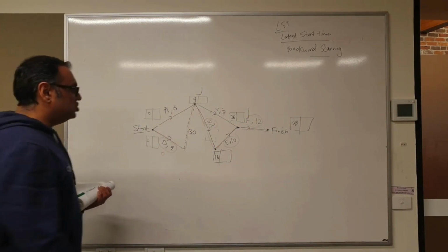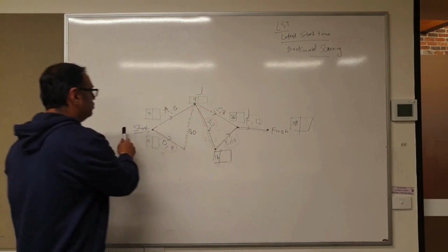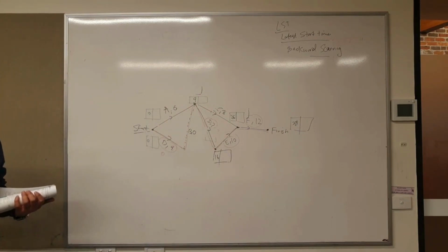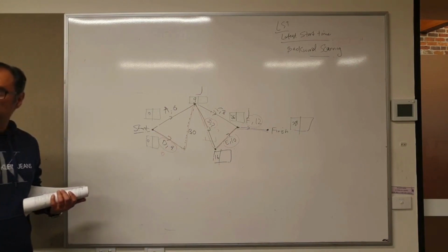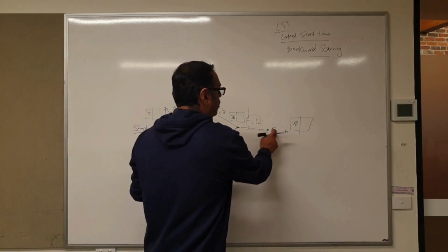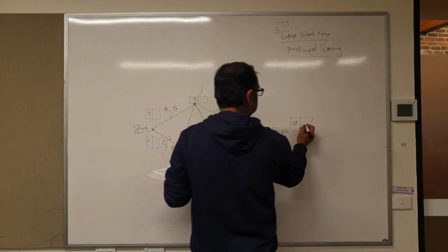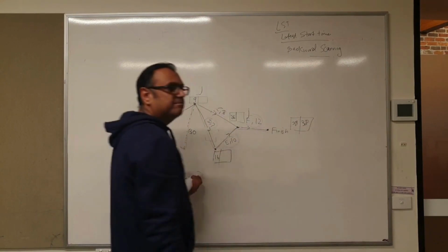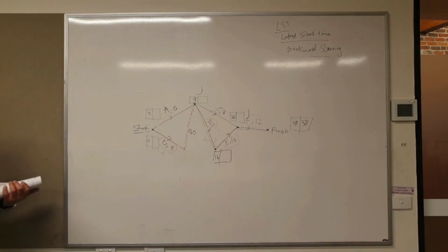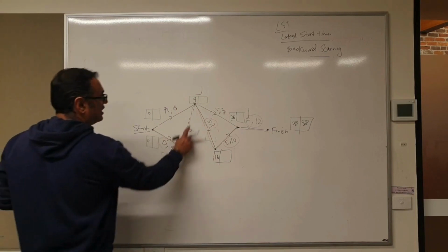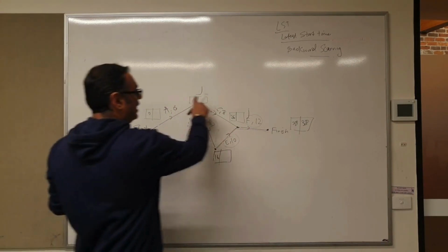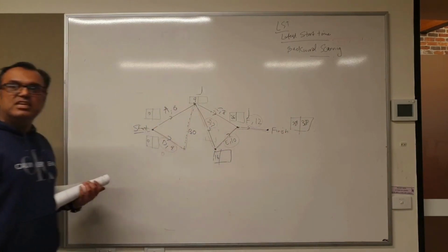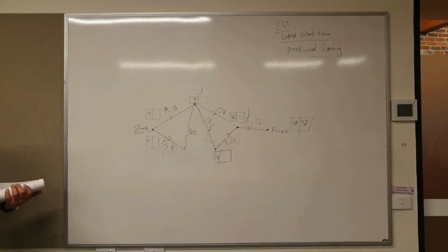You are at the finish and now you are going to go to the start. Norman, is this making sense? Mitch, all good so far? When you are at finish, just copy the same number as is, because you remember our longest path was this red line, which took 38 minutes. My EST gave me the 38th minute.